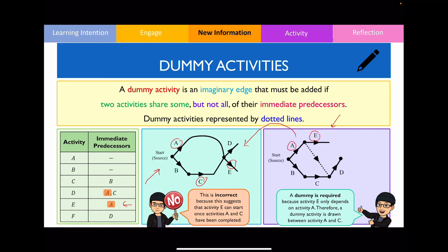This is how you correctly draw the activity network using a dummy activity. I can now draw activity F. To do this I need to complete activity D, so from that vertex I draw an edge labelled F. Looking at the precedence table, both E and F are not immediate predecessors of any other activity, so they converge to the final vertex. I extend these lines until they meet and draw a vertex to label that as the finishing vertex.